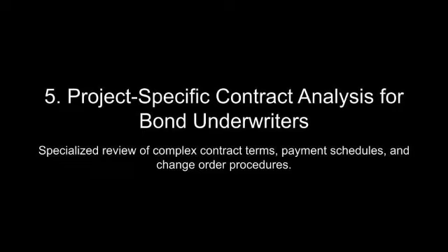One of the critical aspects of interpreting indemnity clauses is understanding their interaction with limitations on liability. These limitations may cap the indemnitor's financial exposure or exclude certain types of damages, such as consequential or punitive damages, from the indemnity obligation. For example, a clause that limits indemnity to direct damages arising from specific acts of negligence by the indemnitor provides a narrower scope of protection than one that covers all losses resulting from the indemnitor's work, regardless of fault.